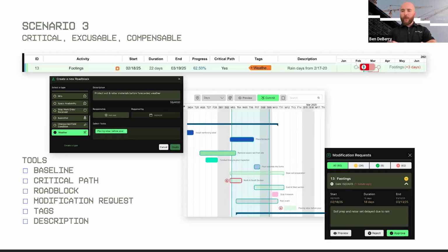One of them comes from Luis, and the question is, for documentation purposes, is it best to have a highly detailed master schedule and then a look ahead that matches it, or to have a more broad schedule and then a highly detailed look ahead? Certainly 2 paths there. The one that is going to work easiest and provide the most opportunity for success is a broadly specified master schedule and a highly detailed look ahead.